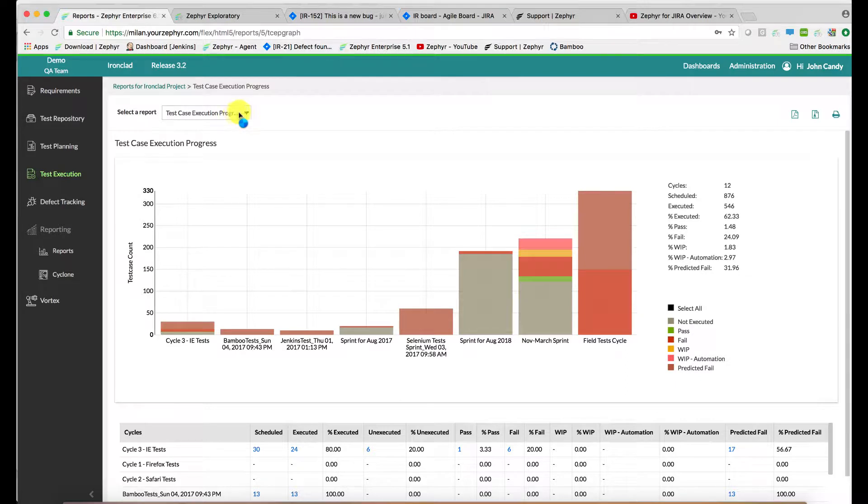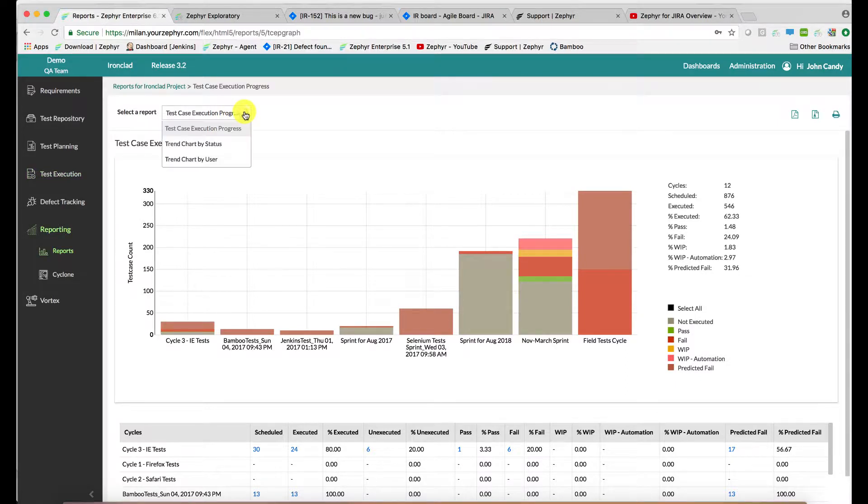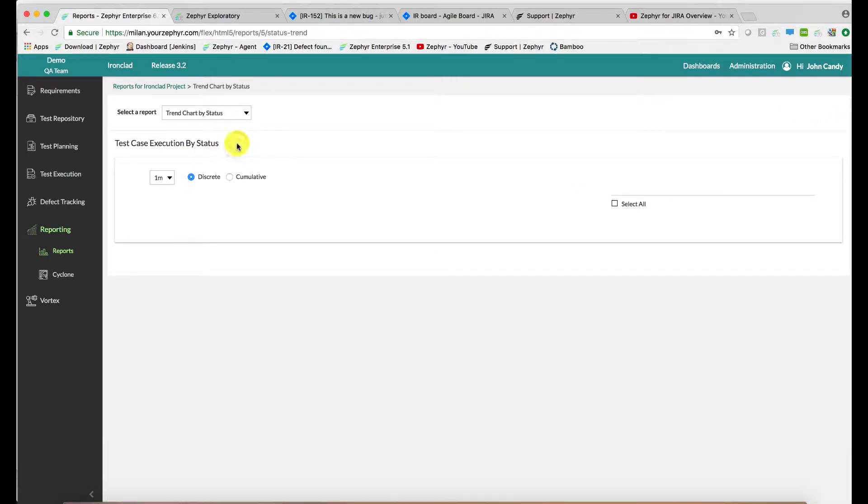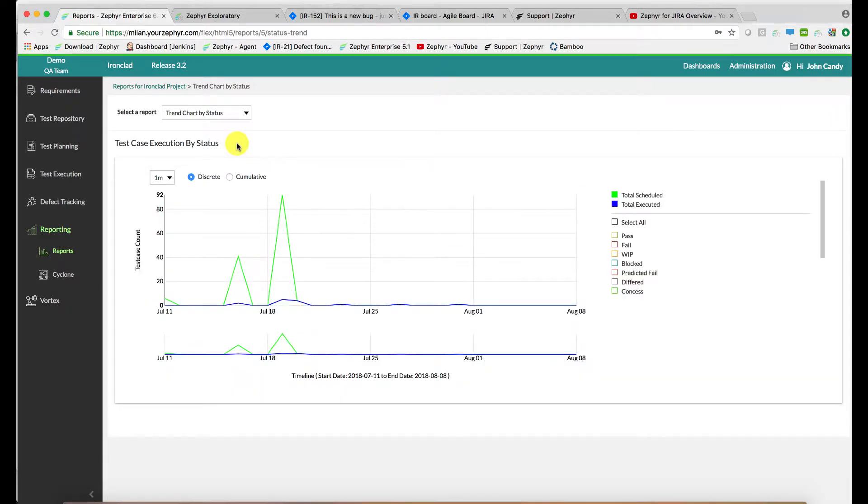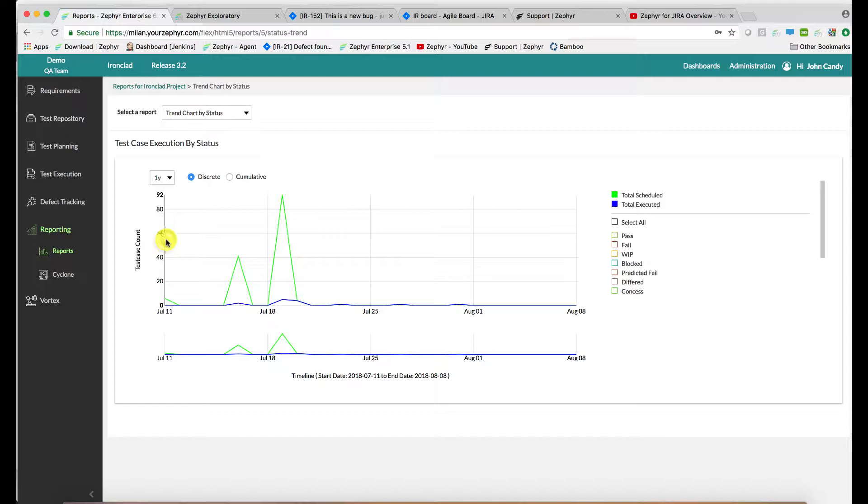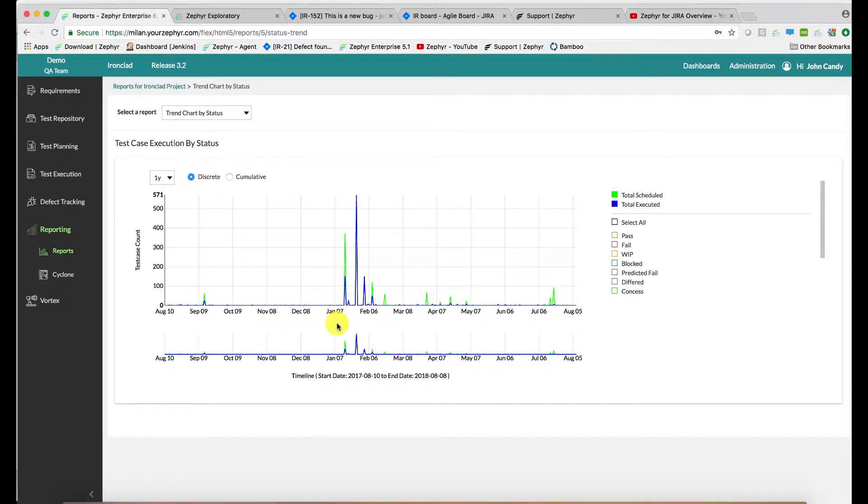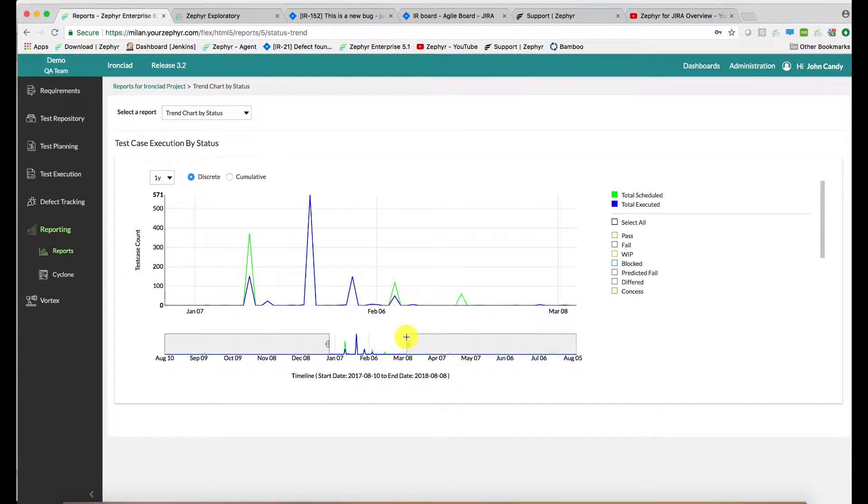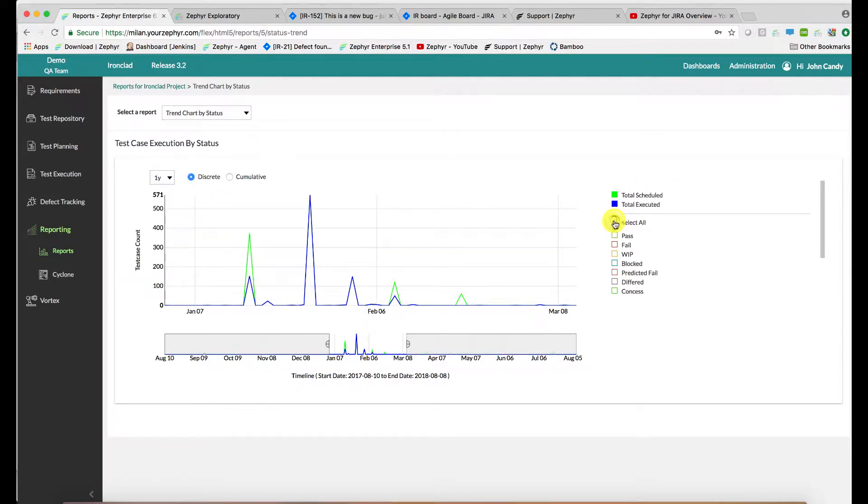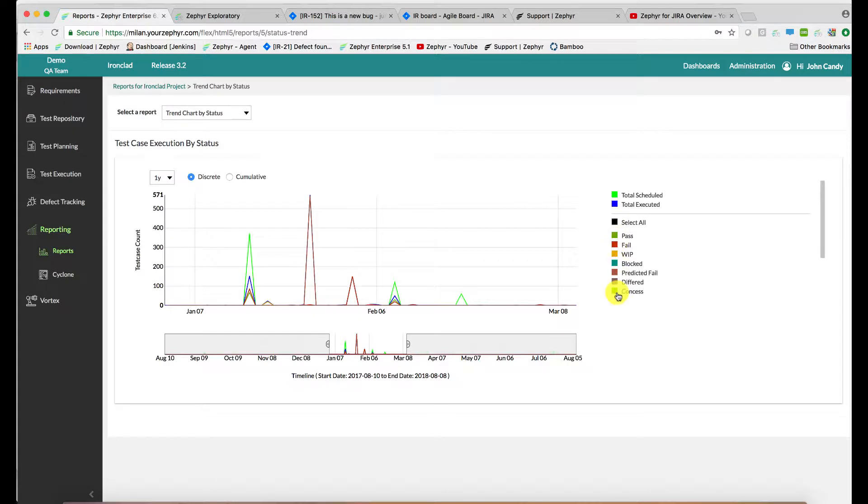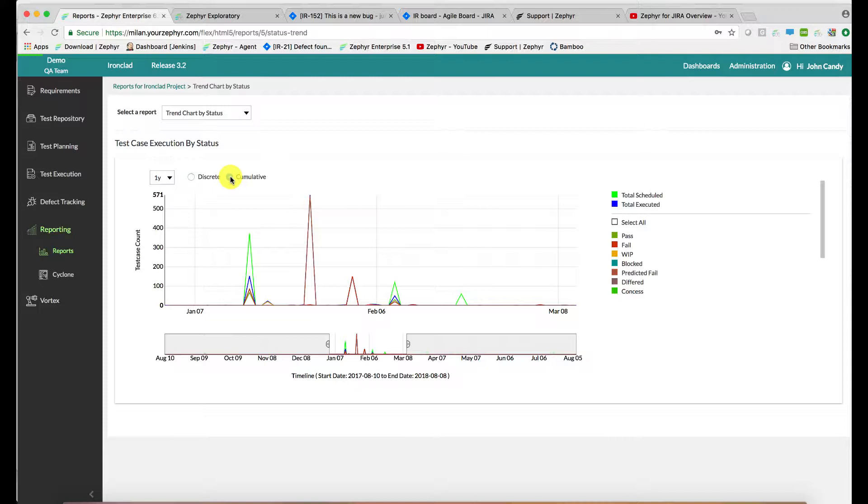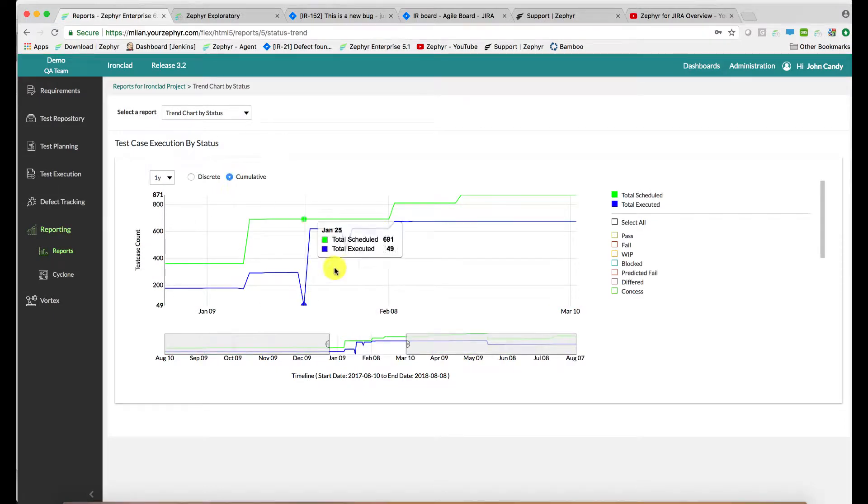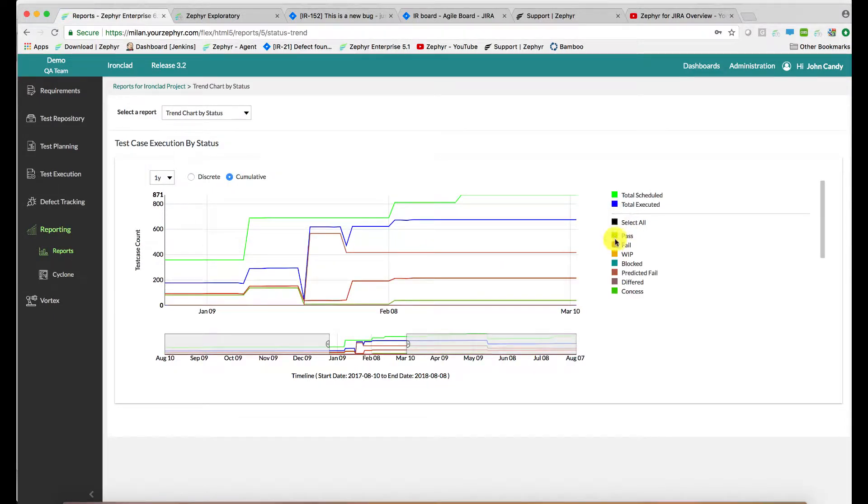Along with assessing the test case execution progress, the reports application also provides you trend chart data. This is by status. So let's narrow in on a time period. This is showing discrete data as a function of the execution statuses, system as well as customized statuses. We can also switch to cumulative mode as well, which shows the ramp up over a period of time of your pass rate and fail rate.